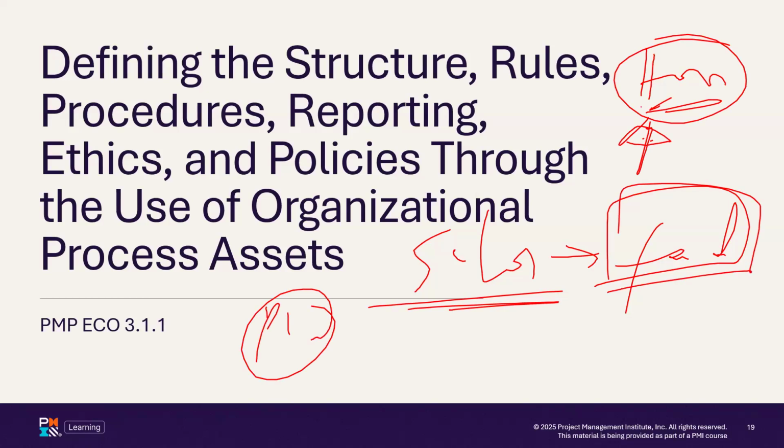In some organizations, they have what we call a projectized structure. So anytime there is a project, a team is put together from various departments based on their skills to come and work on the project. And then they report to the project manager. So that empowers the project manager. Unlike the functional structure, where the project manager has no power, in the projectized structure, the project manager has power.